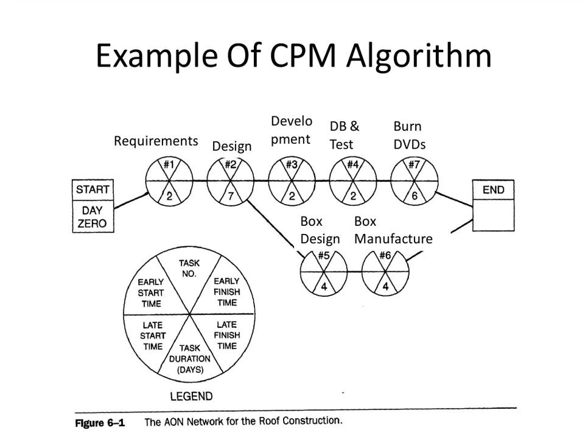So for this task number 7, what is its late finish? Good. That's the earliest time that it could finish. Excuse me, the latest time it could finish without delaying the whole project. Yes. So it's 19, and what's therefore the late start of it? 13, good. How about the next one, late finish? Okay, it's the same all the way back. Now, why is it the same all the way back?